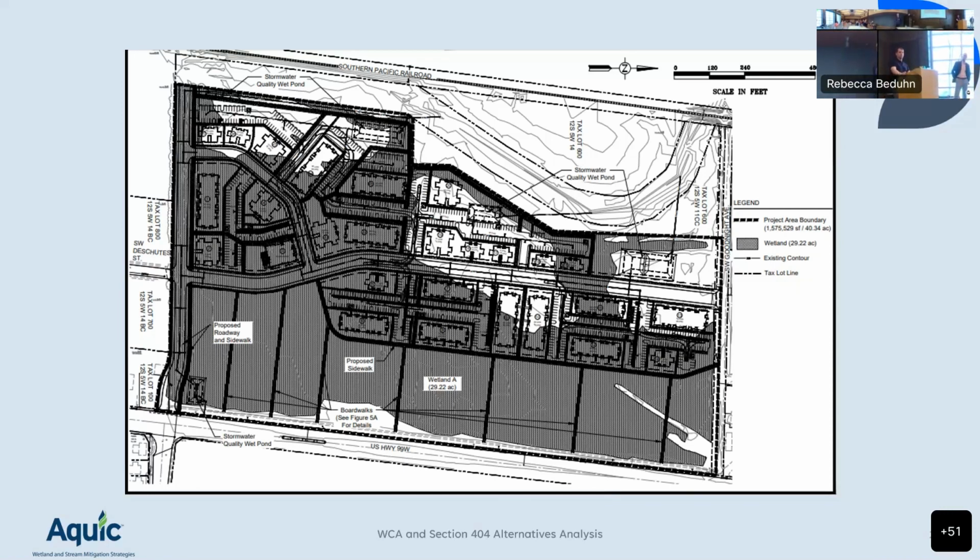Is landowner refusal to sell land generally sufficient to reject an alternative? Yeah, especially if it's in writing. There's a parcel in the same general area that a regulator points to, saying, hey, why didn't you consider that? And they can put it in writing that they actually can't acquire that. Again, it's, can you reasonably obtain that parcel? They can't reasonably obtain that parcel if the landowner won't sell it.